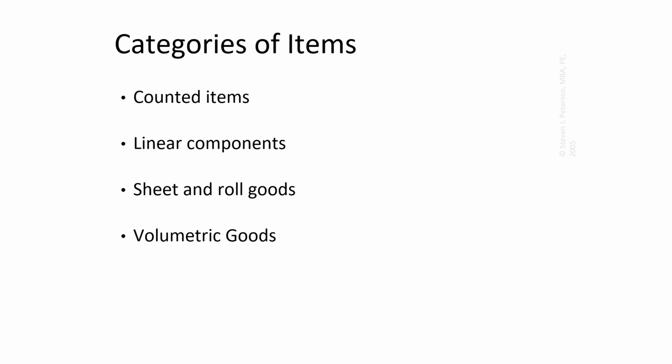Vertical studs you can do in linear footage. I like to break them out by height. Countertops you can do in square footage or counted, depending on how they are. I've done them as individual pieces. If it's a kitchen, I'll just do an individual and I'll call it 12 by whatever, the specific dimensions that it is. Could be counted items.